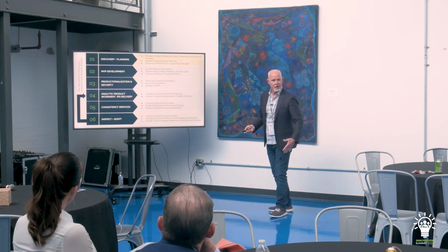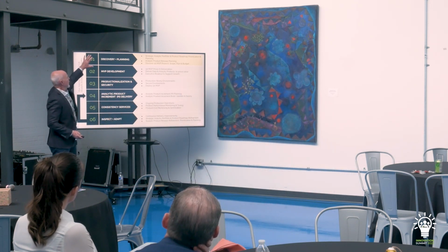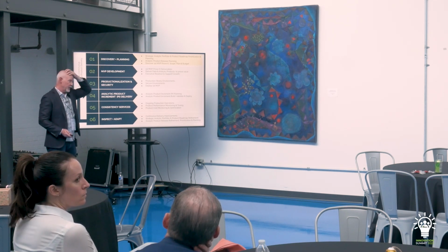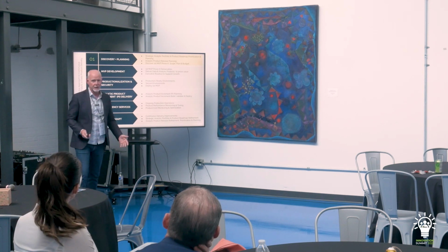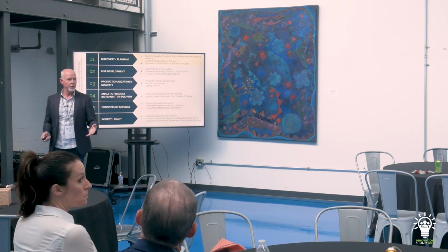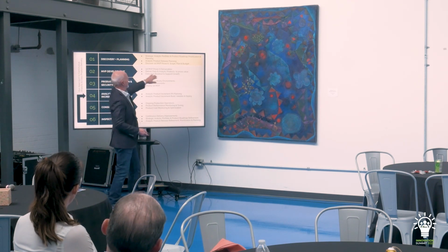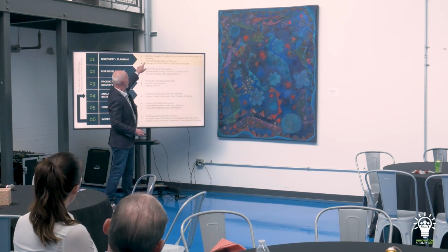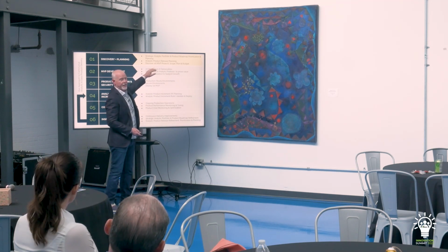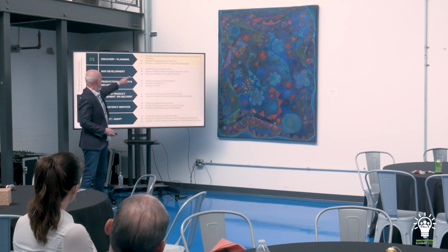When we deliver, this is our product delivery approach. The first thing we do is the discovery of the health of the organization, the current landscape, and where we see you don't have an analytics program, we want to consult with them to build that portfolio plan with them, right? And we'll drive it down to building the portfolio plan, creating the product roadmap, finding that first analytic product that we want to release, scoping the MVP, and then doing a short readout. Here's what the budget's going to be to do that first MVP, and then build that MVP.